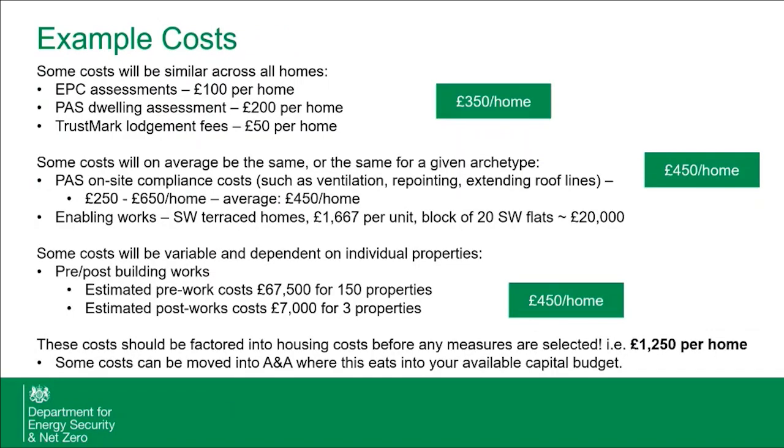Sure. I want to talk about some of the real life experience we're seeing in HUG One. With EPC assessments, we're tending with some suppliers to always get a pre and a post EPC assessment. So has that been factored into your example costing? In this case, it has not, or you can take the EPC cost, because that's logged as an additional cost, as £50 pre and post, so £100 per home across.